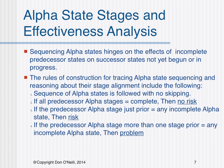Sequencing alpha states hinges on the effects of incomplete predecessor states on successor states not yet begun or in progress. The rules of construction for tracing alpha state sequencing and reasoning about their stage alignment include the following. Number one, sequence of alpha states is followed with no skipping. Number two, if all predecessor alpha states equal complete, then no risk. Number three, if the predecessor alpha stage just prior is equal to any incomplete alpha state, then there is risk. If the predecessor alpha stage more than one stage prior equals any incomplete alpha state, then there is a problem.